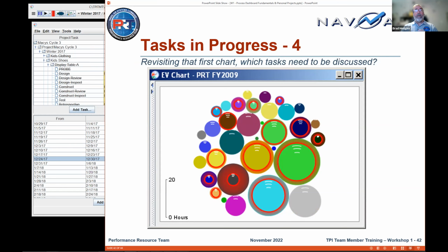If someone's over a week of labor and they're over budget or over their planned time, they should be reporting on how they're doing on that task. And if they're not, the team should intervene and say, Jimmy, do you need help with that? How are you doing? You're almost done. They just don't want to ignore it, because what happens is next week it gets even bigger, and bigger and bigger. When do you eventually address this? Because the team won't meet a commit date until all these tasks are signed off. And so now you're looking at this pile of tasks.